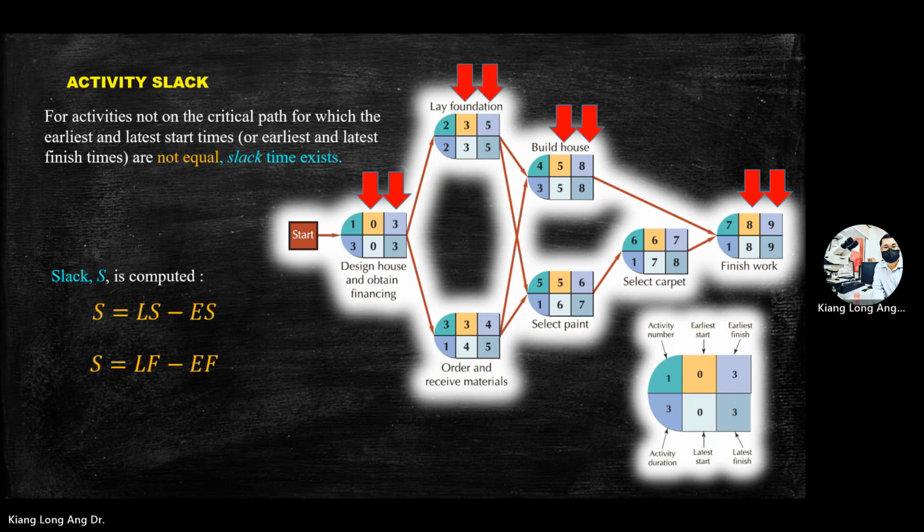Within this slack time, as a project manager, you can prepare some activities beforehand, or manage another project at this time. For example, maybe activity 3 uses a machine that is not required for your project at this time. So you can share your machine with another project for 1 month, then pull the equipment back to your project. This is more on resource planning.